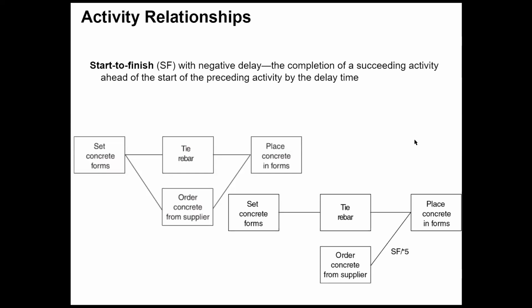Here is a negative because when you're adding the relations like finish to finish, start to start, and start to finish, you can simplify the finish to start relations to only 1, 2, 3 lines. And here has 4 lines, right? We reduced this one because you are given a relation change. This one to that one is start to finish with a -5 days delay. So with this -5 days delay, that means you need to do it in advance for 5 days.